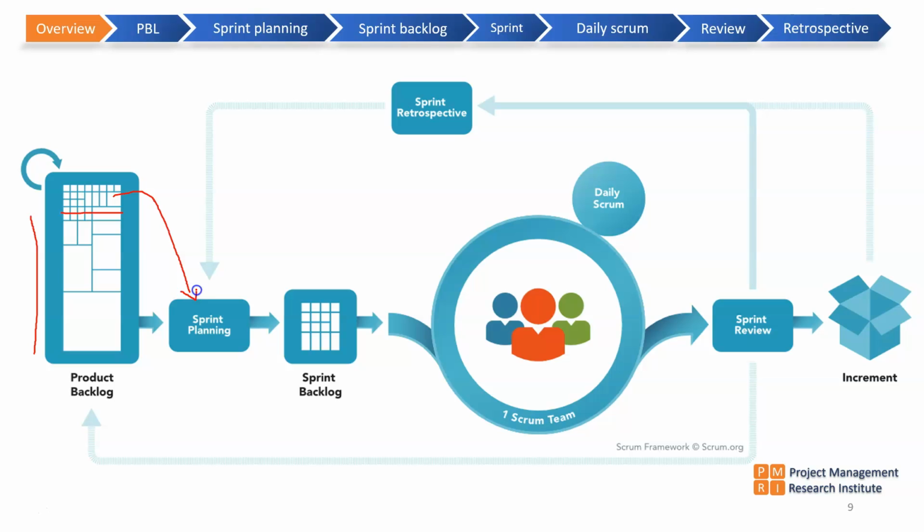So this is recommended by the product owner, saying that in the next sprint I want to complete maybe this much. And the team gets into a sprint planning meeting where the duration is 8 hours. They discuss, they estimate, and at the end of it they commit to a set of features, and that becomes the sprint backlog.